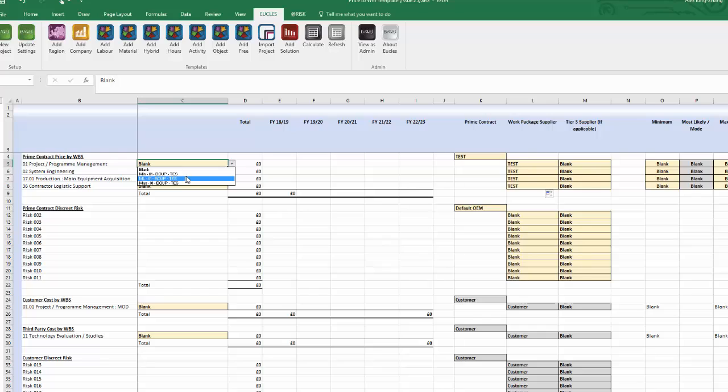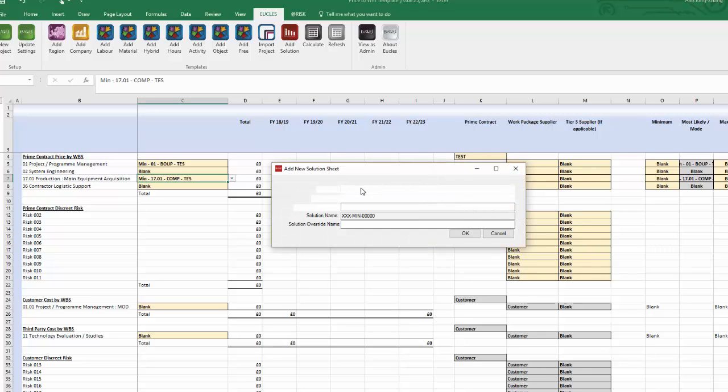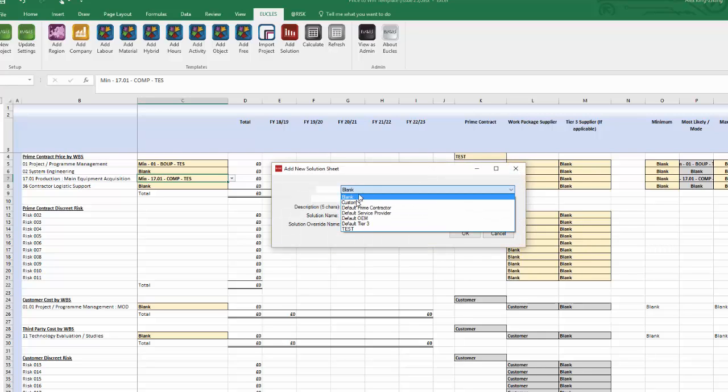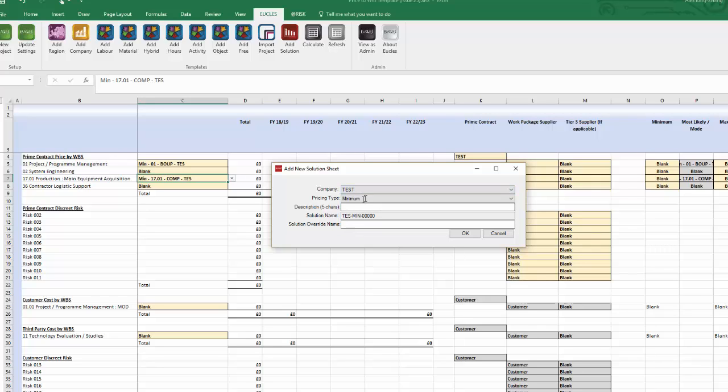Okay, so by that I mean that the customer might have had to pay for some technical studies to be done, some feasibility studies at the start of the project, and we need to account for those costs in terms of deducting them out of the customer's budget, so we can see that our overall offer is still affordable in the context of the whole budget. But the tool understands that that's separate from the price that we're going to submit to the customer, so we're counting them differently.